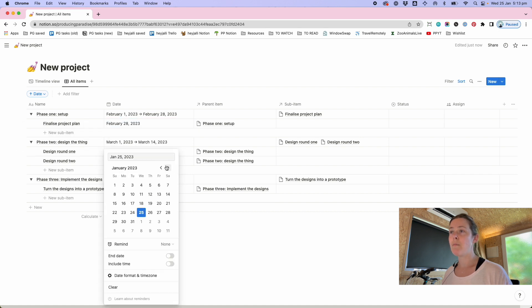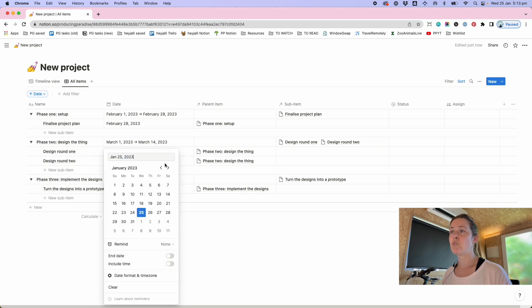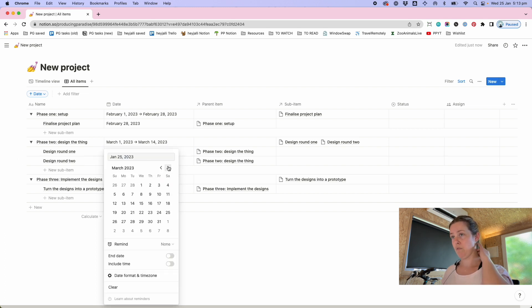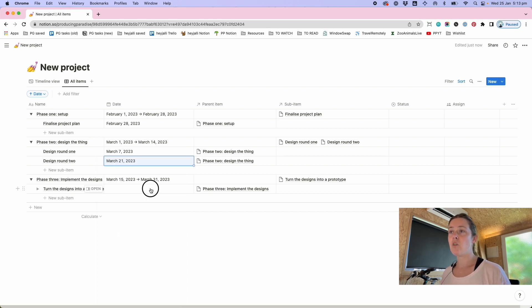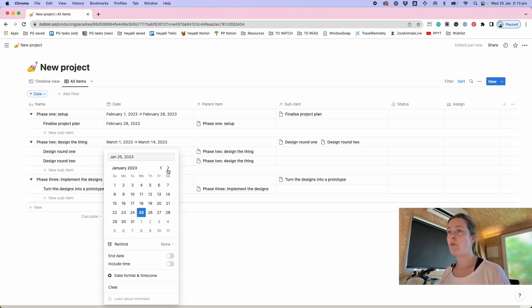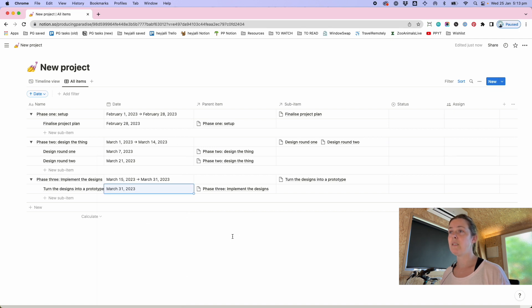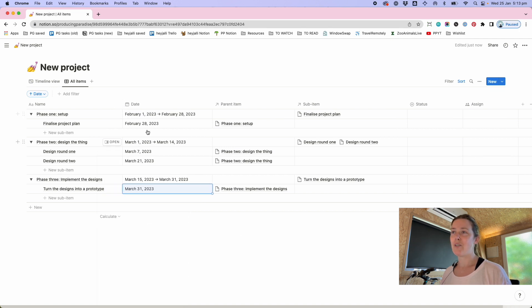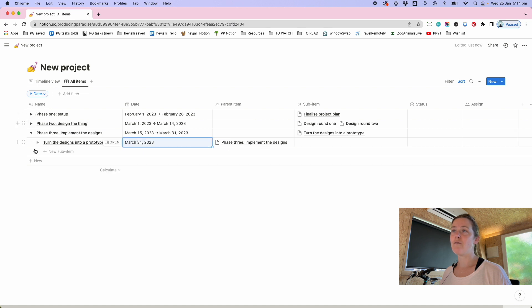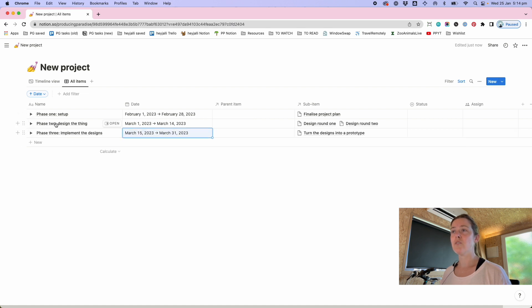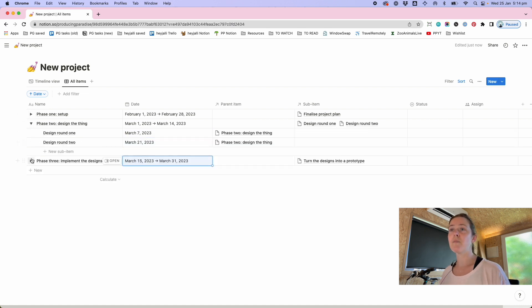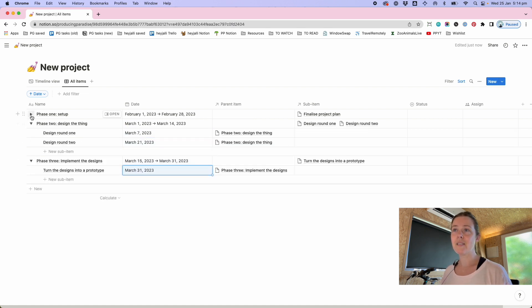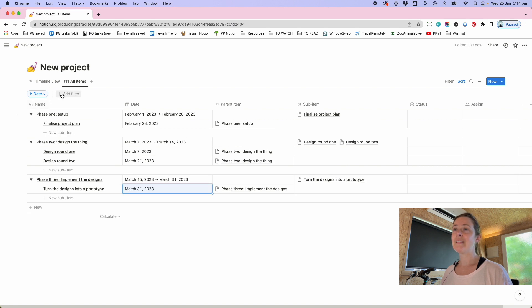So finalizing the project plan that might be something that I want to have done by the end of this first phase so we would put that somewhere between the 1st and 28th of Feb let's say by 28th of Feb. Design round one well maybe we need the first week of the project to do that and design round two maybe we need the second week of the project to do that and then turn the designs into a prototype maybe that is the thing that's due at the end of the project very quick and dirty.